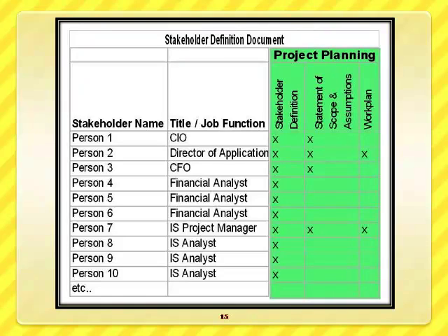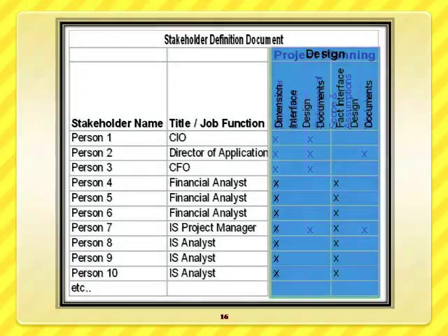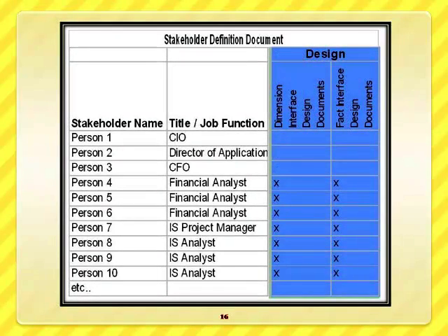deciding who the stakeholders are and what the roles are in each phase. In project planning, these are the roles. In the analysis phase, these are the roles of the stakeholders. In the case of analysis, operational requirements, all the people are mostly involved. In the fact definition stage, the system analyst people, the technical people, need not be involved. Only the top management people are enough to be involved. Similarly, in the dimension definition, in operation requirements, all people need to be involved.